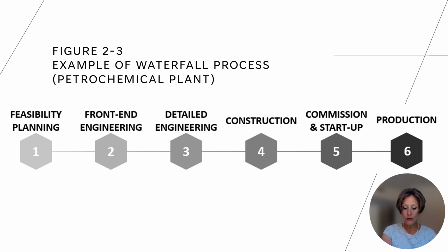Each phase of work includes milestones and deadlines that serve as gates to move the project to the next phase. Phases of work typically involve different functional team members to handle the changing scale and scope of work. A defining characteristic of a waterfall process is that each step must be completed before moving to the next one.